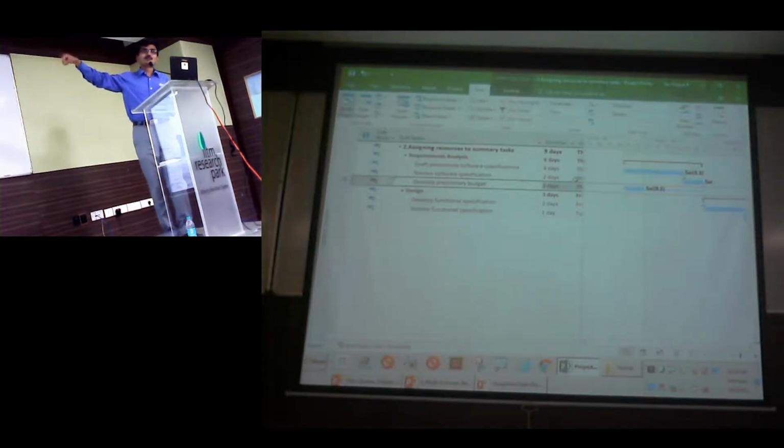Now you see that the overallocation is automatically resolved, but the side effect here is now the task is taking longer. Yeah, the duration is longer. So you need to balance it, right? That's all it is. You need to go manually and adjust later. Good. So is everyone clear about the tips so far? Please challenge me with questions.